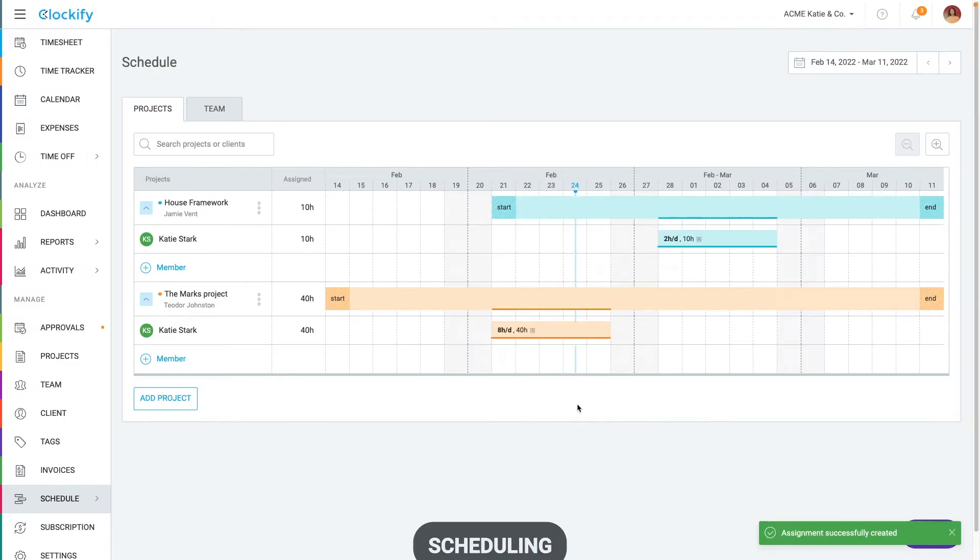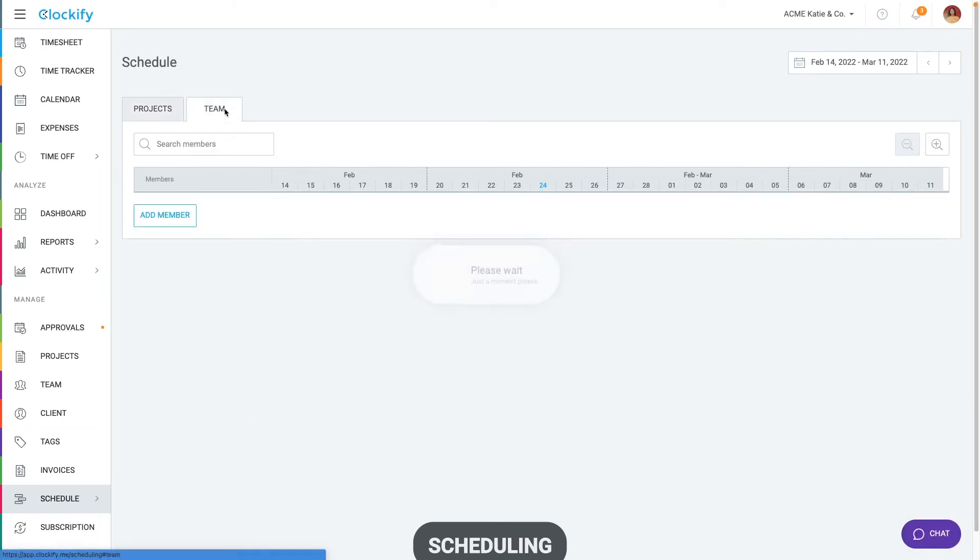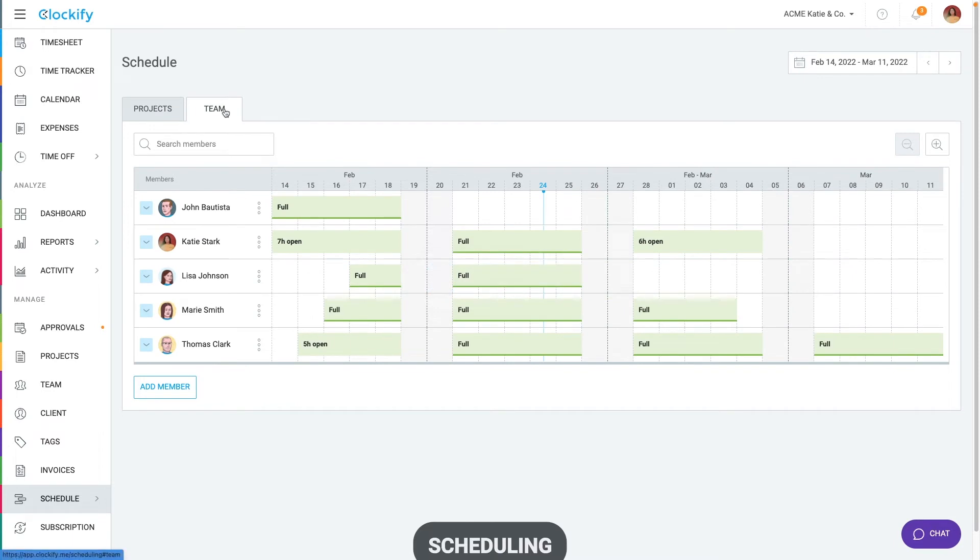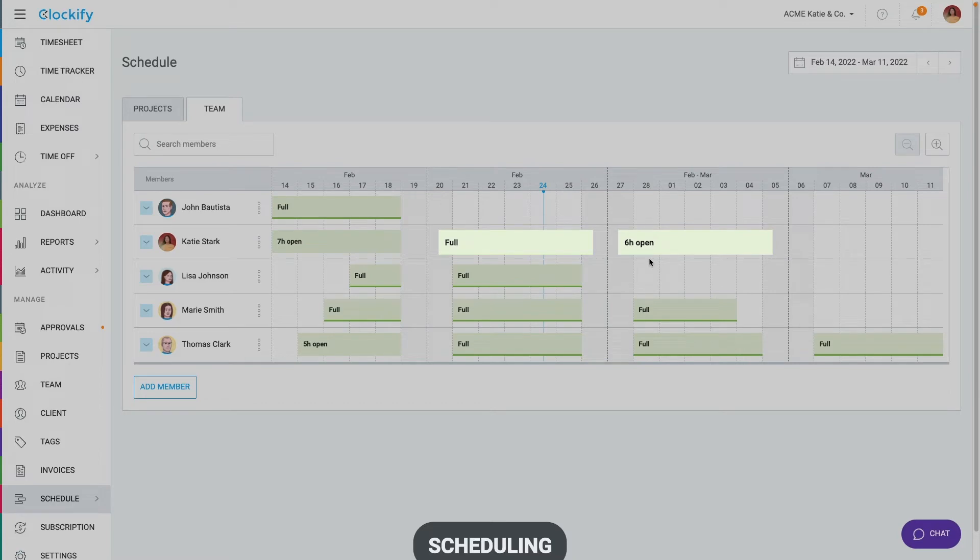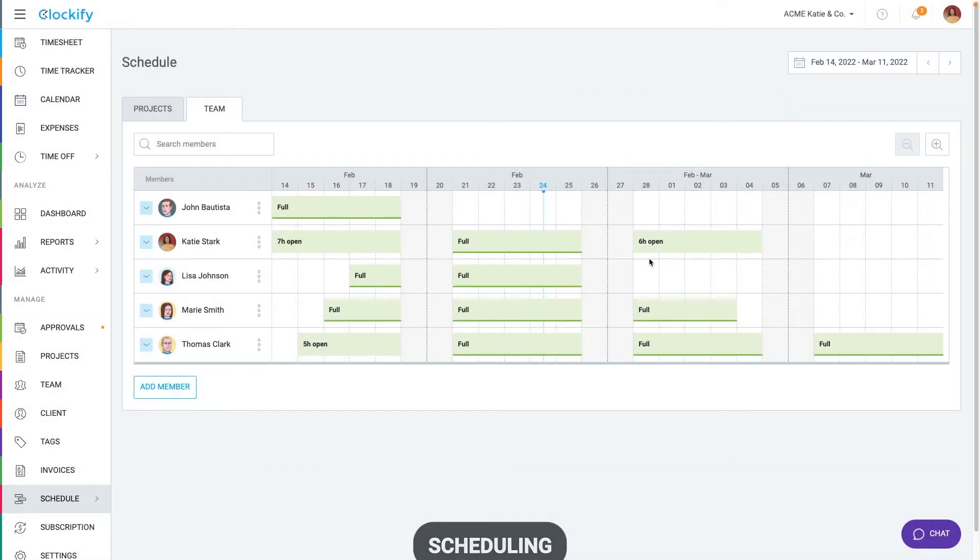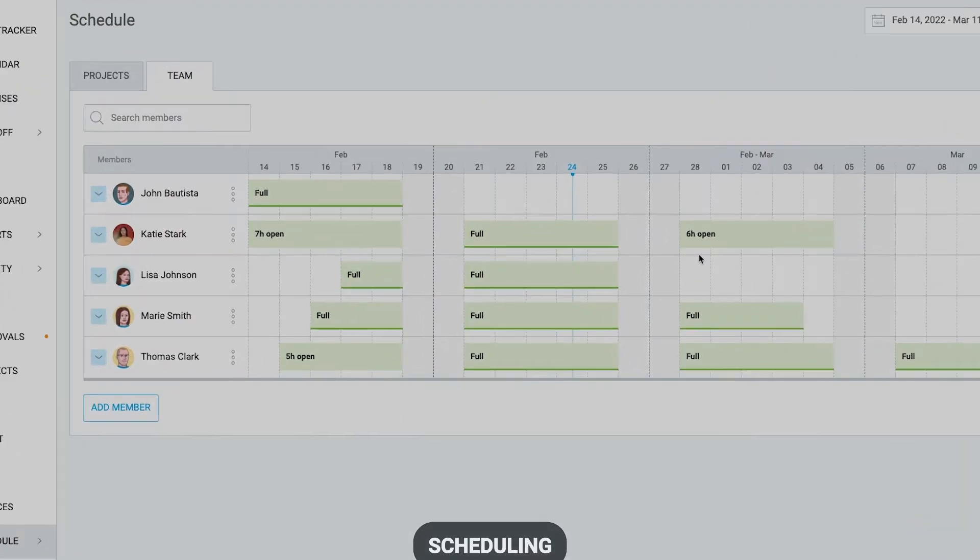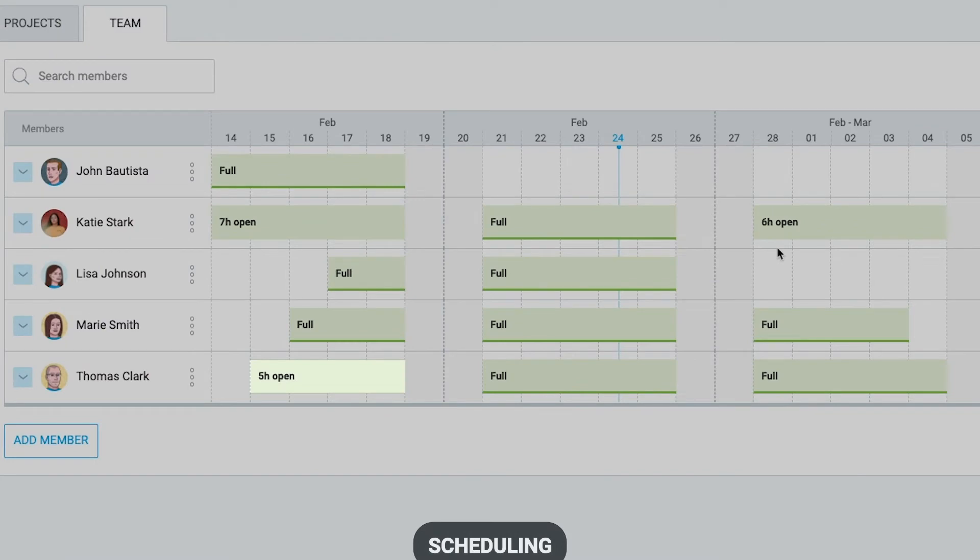Now, when another client contacts you for work, you can check your schedule and see if you can take more work. We can go to team tab and see that our schedule for this week is full, but we have six hours open next week. You can schedule assignments for your team members the same way and later see who can take more work and who's overbooked.